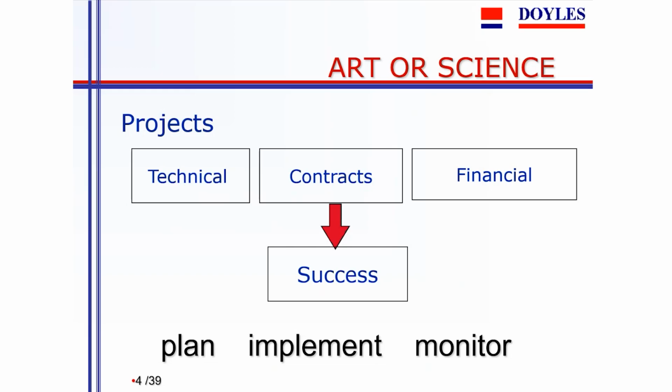For instance, a client of mine put in a bid for a project, but he didn't add it up properly and he didn't allow for a whole slab of work, but he put in for a lump sum contract. The other side then insisted that, well, he should perform the contract even at a financially disastrous rate. The situation was eventually, by negotiation, he carried out some of the work, but was able to avoid the loss that would have come from performing it all.